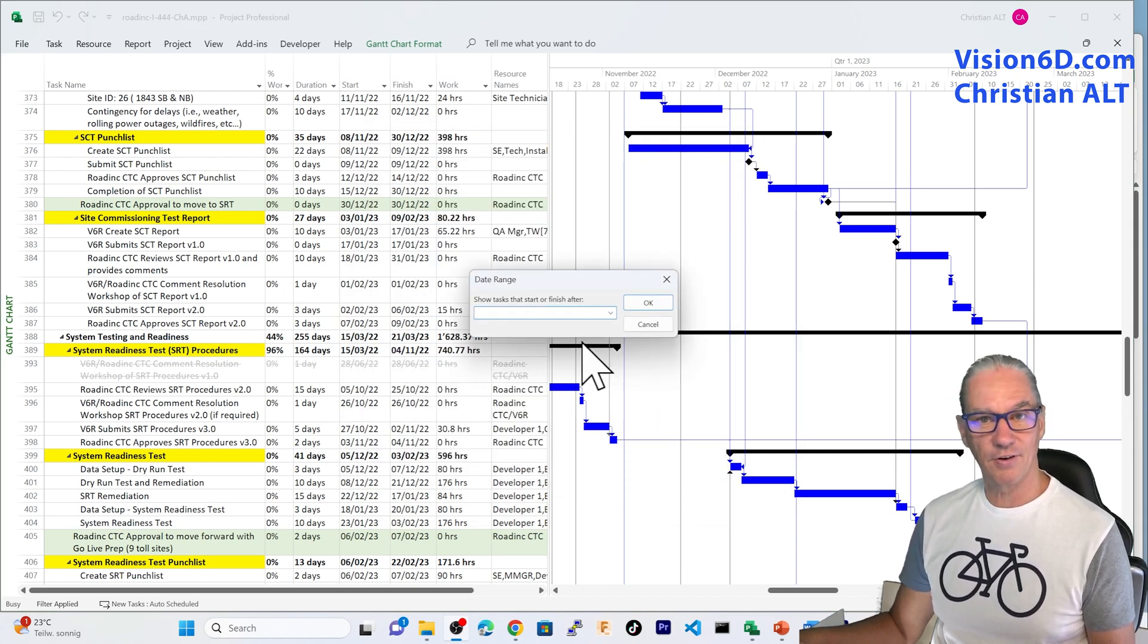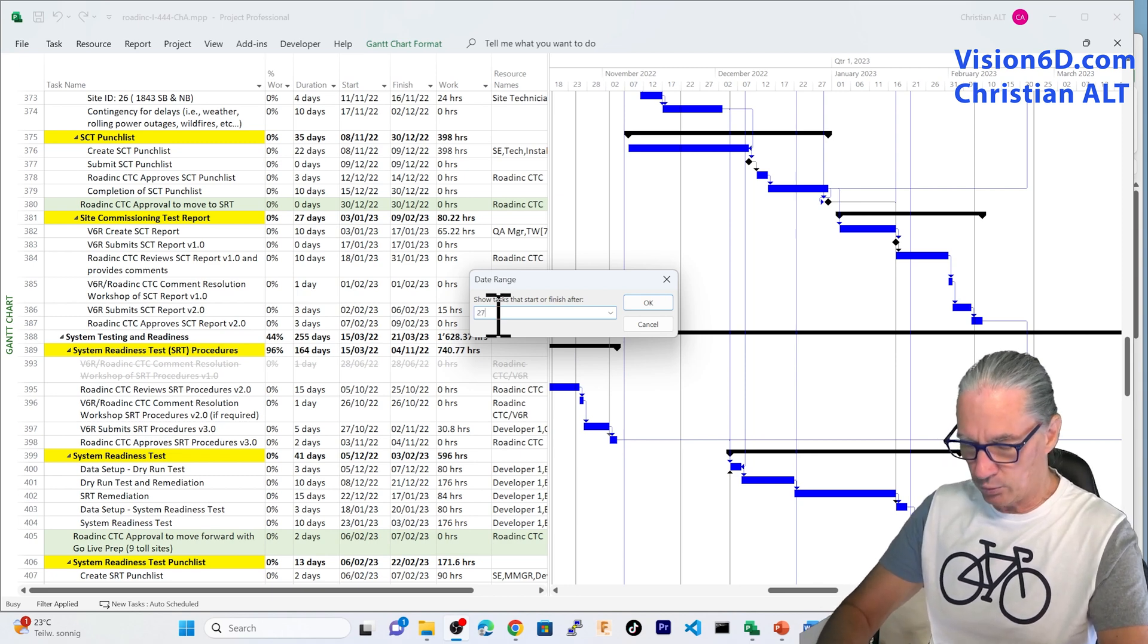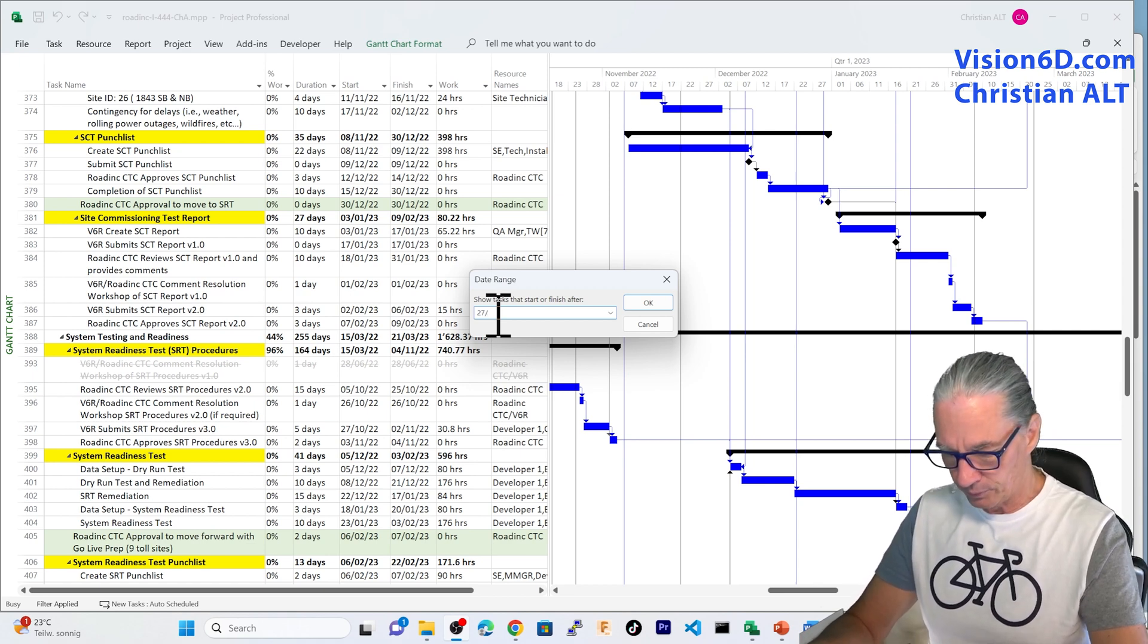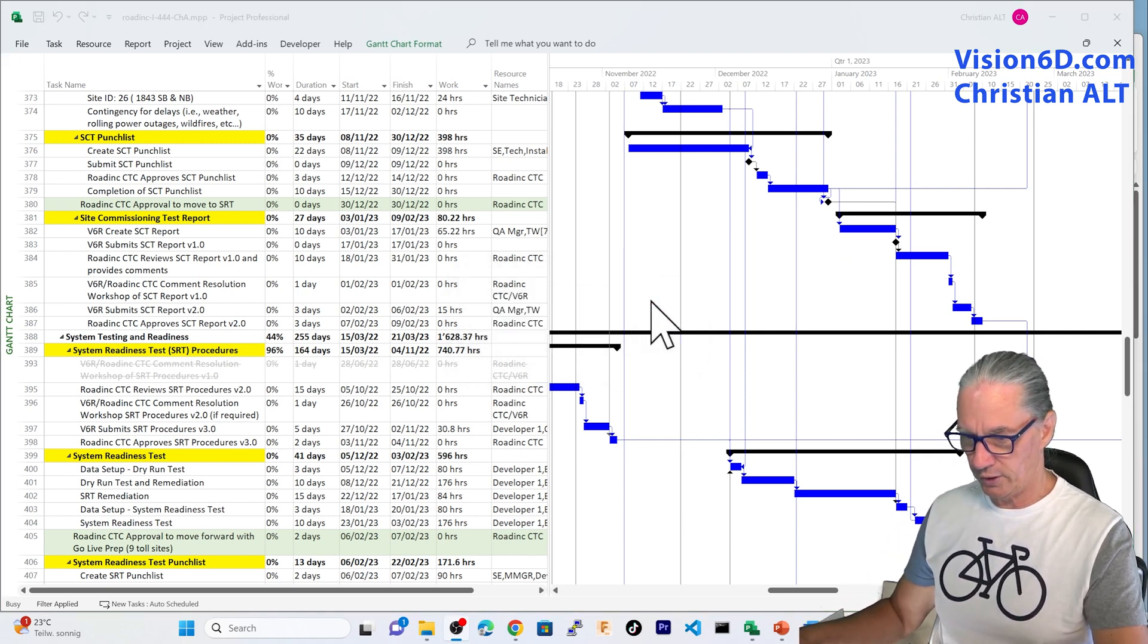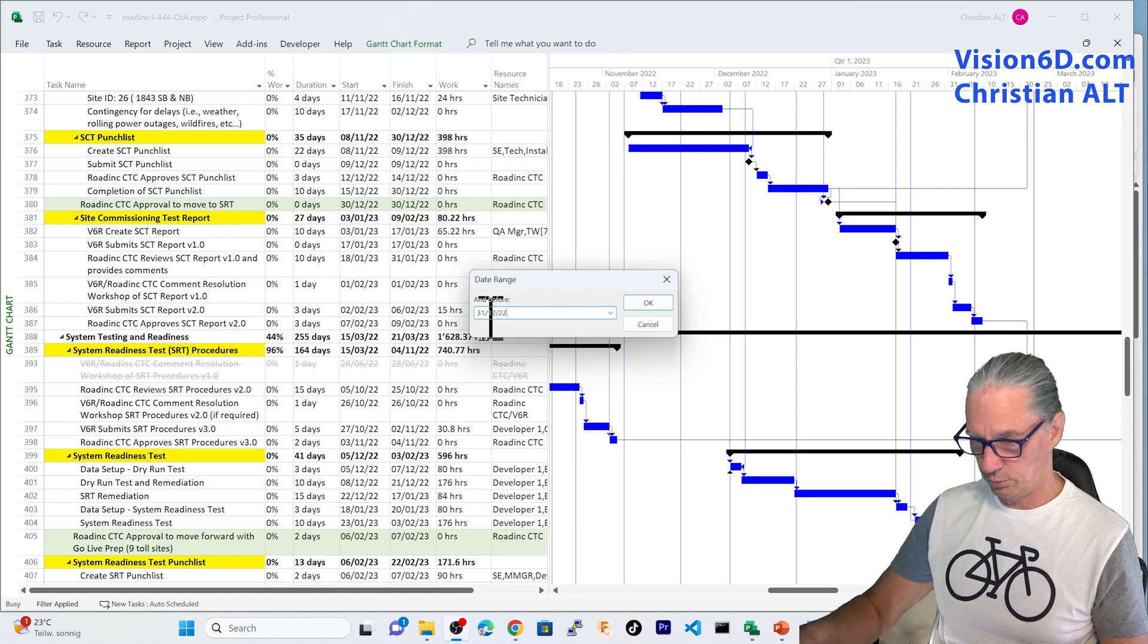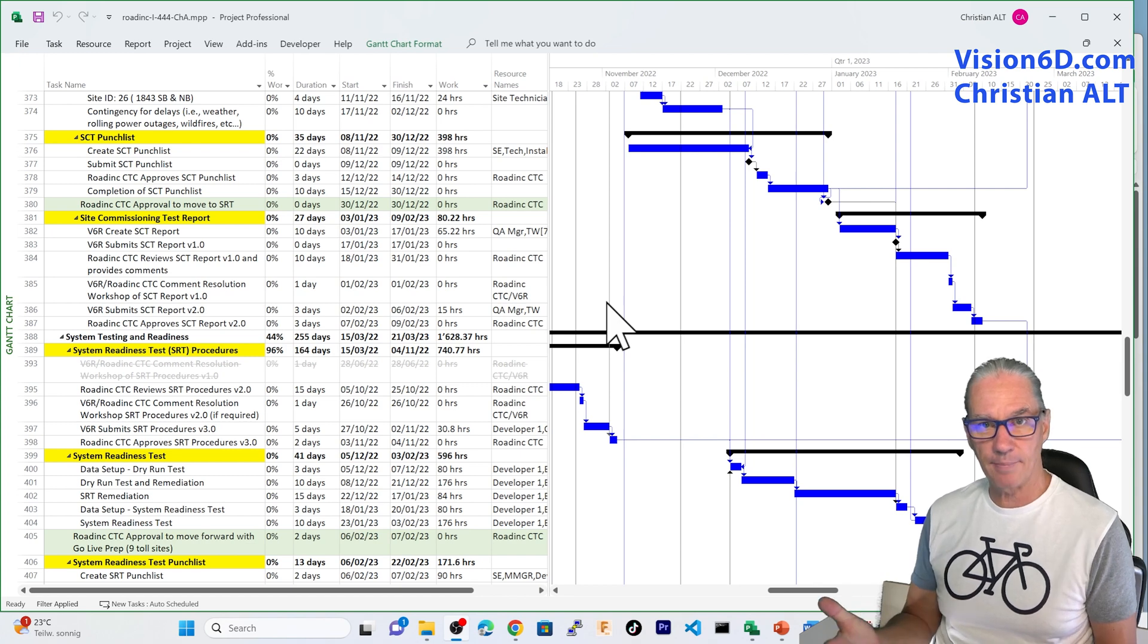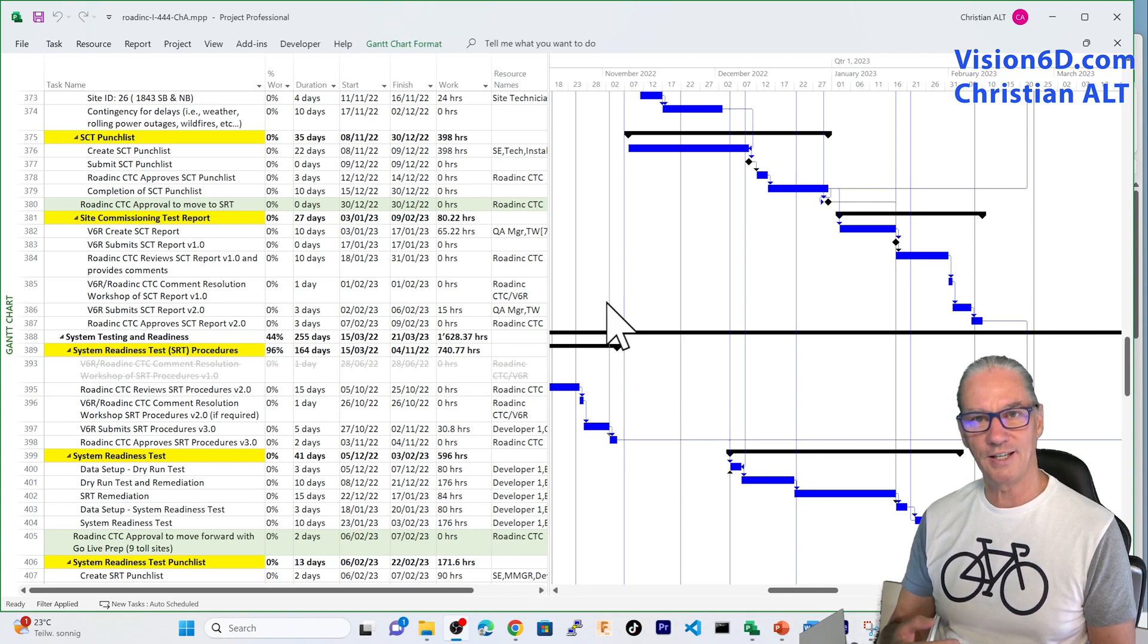Since I have a filter that is set, you see that my filter is activating. So, the first thing that I'm going to say is that I want, for this project, the range of November to December. So, it will be from the 27th October 22, the start of the range, up to the 31st December 22. And I'm saying here, OK. And now, something has happened, but we don't have any feedback. So, for me now, I have to go and open the Excel file.